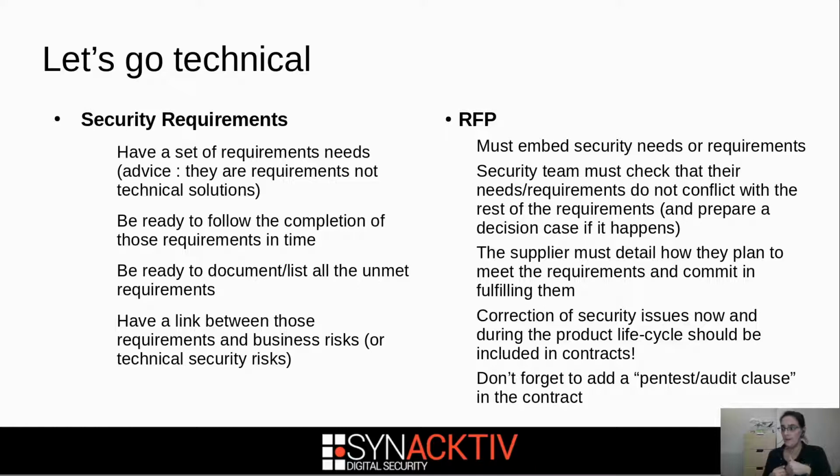Your supplier or the team who is going to develop must detail how they plan to meet your requirements. So if you said, for example, again, I want an authenticated connection, they should say, okay, I plan to put HTTPS with this crypto suite and this type of certificate, for example. You should be able to say to your supplier or your developer team, okay, this actually fulfills the requirement. No, it doesn't fulfill it.